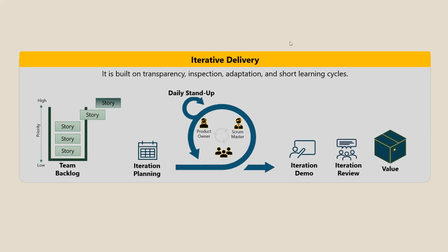One thing SAFe does is, as people who are familiar with Scrum can look at this slide, the terminology used is not exactly what you use in Scrum, right? If you look at the slide, can somebody who is familiar with Scrum tell me quickly what differences they observe on this slide from traditional Scrum? The sprint backlog is called the team backlog here. Wonderful. And, yes, sprint planning is called iteration planning. Yeah, and so on and so forth, right? Sprint is replaced by iteration. And the Scrum daily is called the daily stand-up.